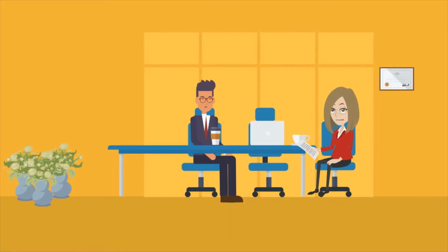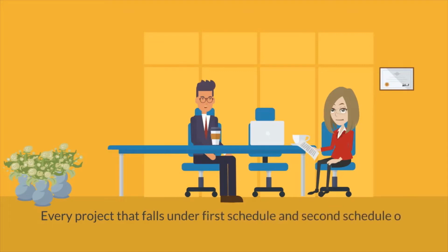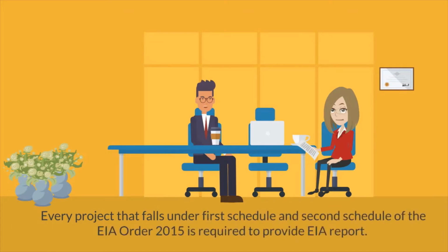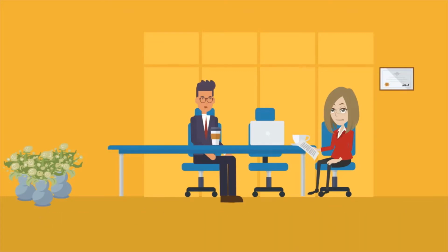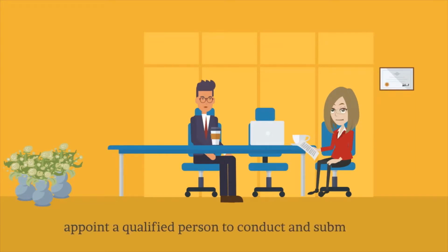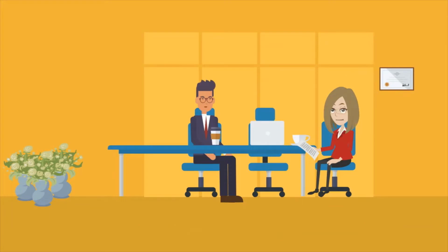EIA is not a new thing in Malaysia. Every project that falls under the first schedule and second schedule of the EIA Order 2015 is required to provide an EIA report. Under the EIA Order 2015, any person intending to carry out any prescribed activity shall appoint a qualified person to conduct and submit an EIA.